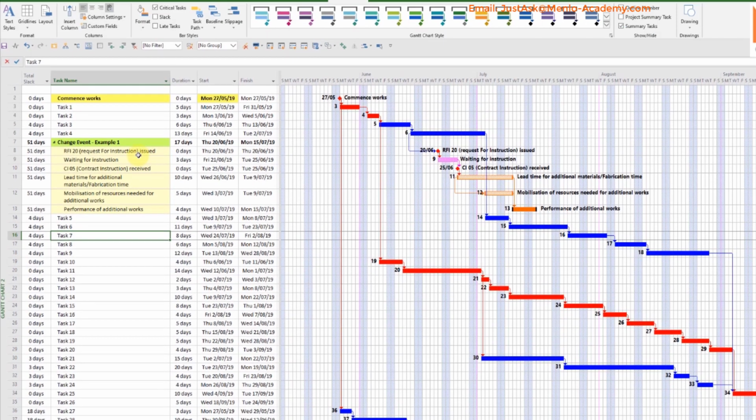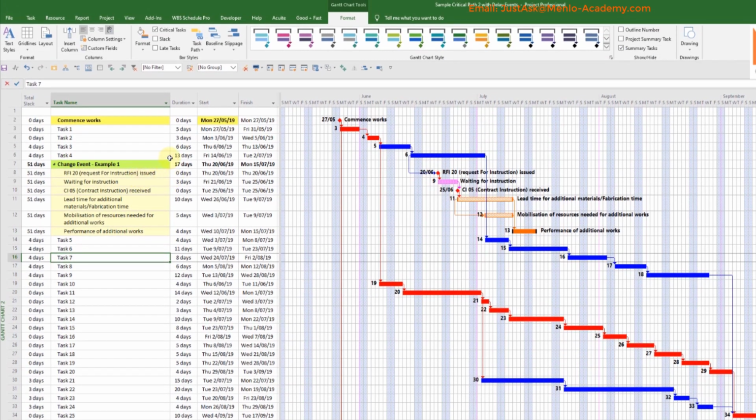Now, whenever an event happens, something unforeseen, or there's a change, you hit a problem. So in this case, if we're assuming that this is excavation across site, 5 days in, you find the soft spot. So you immediately flag it and you ask a question of the engineer.